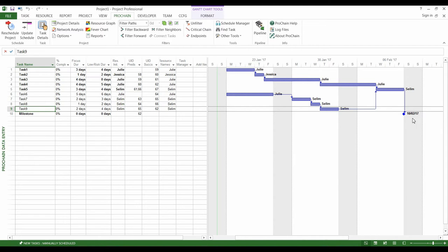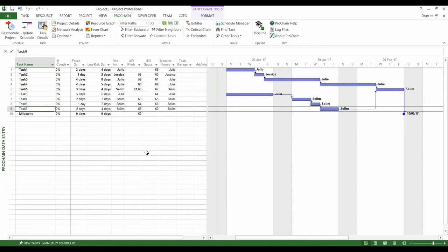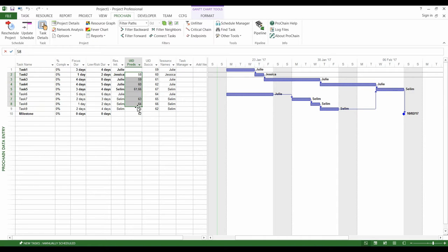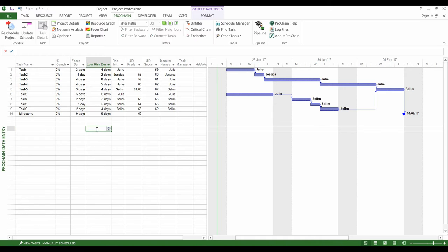The critical chain methodology requires meticulous planning and so you may have to specify more information than what you usually do. For example, we need our network to be dynamic. That's to say we want a modification on a task to have consequences on others. So, we need to specify the links between the tasks and their durations rather than just indicating start and finish dates for each task.